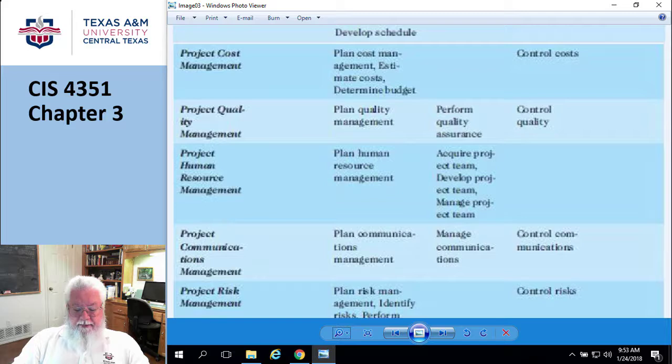So, identifying a project sponsor. Remember, the project sponsor is the guy who has the weight to be able to call a meeting and everyone will show up. You're probably going to also pick a project manager at this point. You go, hey, Bob, you want to take on another project? Sure. So Bob's now the project manager. You're probably going to develop the business case, the justification for doing this. I've harped on that before, but there's got to be a valid reason. You don't just do projects for the hell of it.